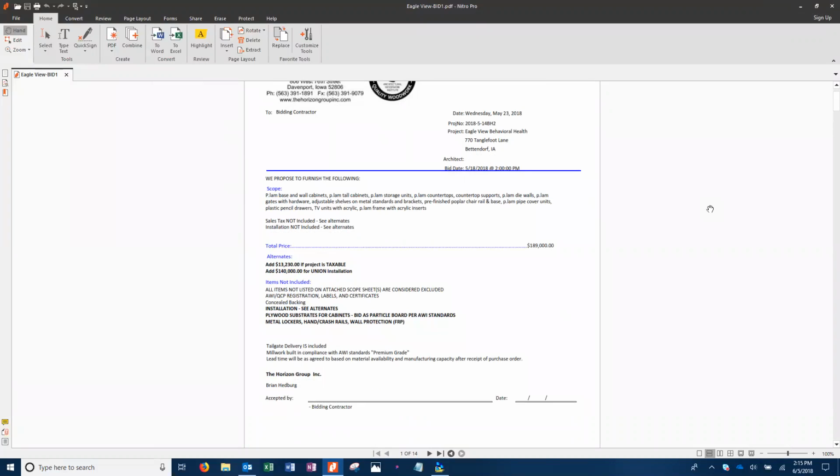As far as your alternates and any change orders, you can have them print on a separate page at the end of your quote, so they pull that dollar amount out until they've been approved. They would automatically be there at the bottom. We haven't even touched on those, so we'll do that today so you can see what they look like. And then items not included, to me, that would be a great exclusion or your footer. So we can make this all be on one document if that's the way you'd like it.